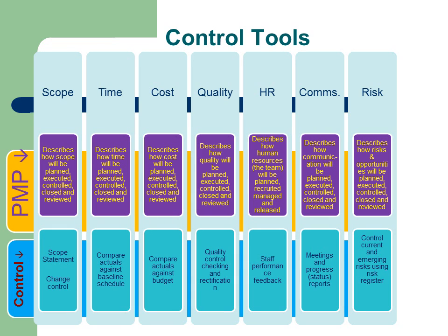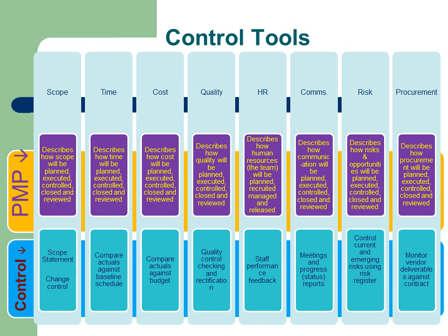Risk control. The PMP describes the project risk management process. The risk register is the risk control document. This must be monitored and updated throughout the project in order to control current and emerging risks. Contract or procurement control.